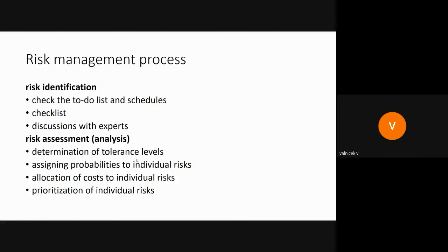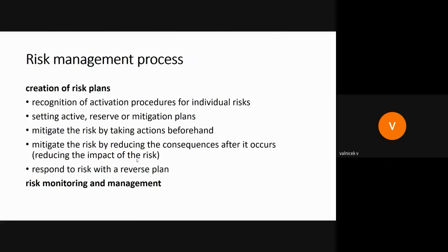Determination of tolerance levels, assigning probabilities to individual risks, allocation of costs to individual risks, prioritization of individual risks, creation of risk plans. Based on the analysis, you need to recognize